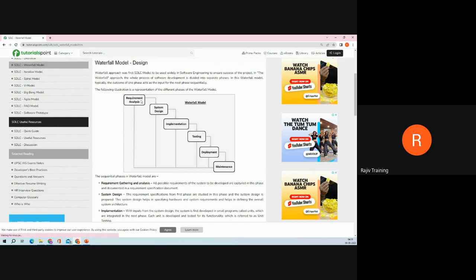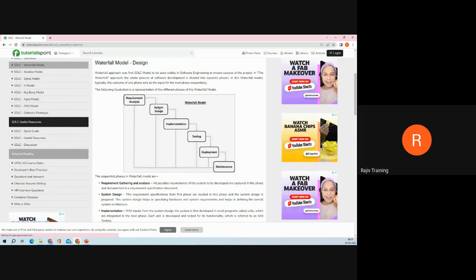It's now passed on to the design team. Based on the requirements, the design team comes up with the design. And once the design is done, by the way, here your job is done. You move out. Once the design is baseline, their job is done, they move out. And then is the development team. The development team takes it up, starts the development, completes it, and then passes it on to the testing team. They move out. They're no more part of the project. Pass it on to deployment, meaning you launch it and then you maintain it.